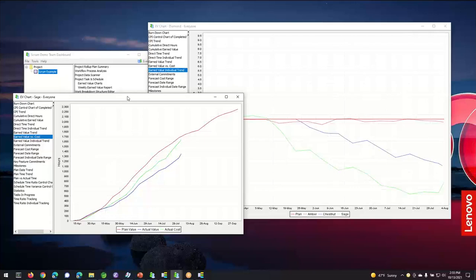One of the things that we've discovered within the high maturity community is that if your corrective action plan is "work harder," that corrective action plan will almost always fail. You've got to understand the 5 whys. Why is it that we're behind? Get down to the root cause and fix that root cause. The high maturity data that the dashboard is helping you gather gives you that insight into fixing the right problem.